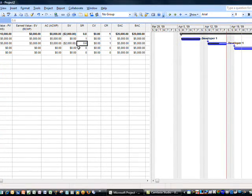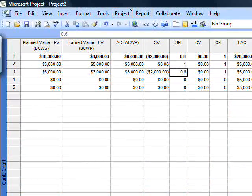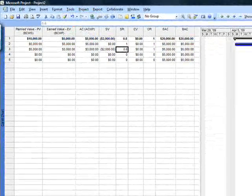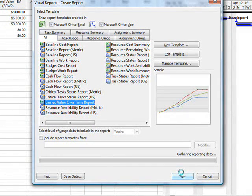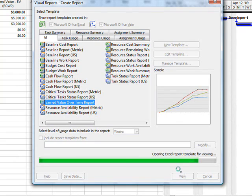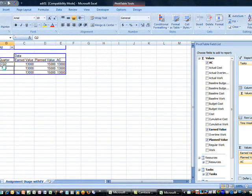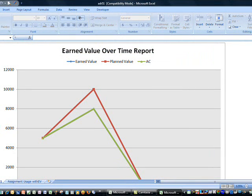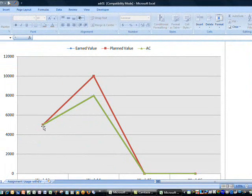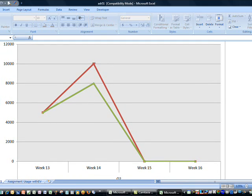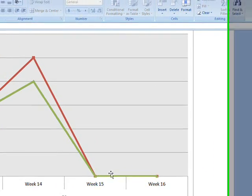I hope this takes the mystery out of it — it's really quite straightforward. Now, I said we would approach earned value techniques in Project. The 2007 version offers the ability to do a quick visual report. If you choose to do this, it's visual reports — earned value over time. It creates a cube. I'll expand just to show by the week. If you need to present the data in a graphical way, this is a very easy way to get it out. First week, second week — you see that I have a variance: 8,000 to 10,000. And then no data in the third week or in week 15.